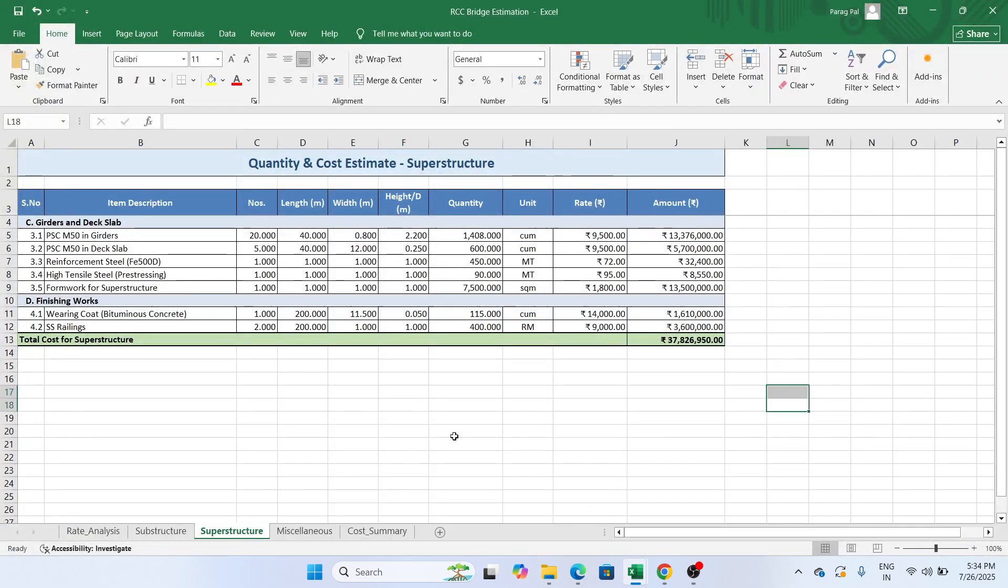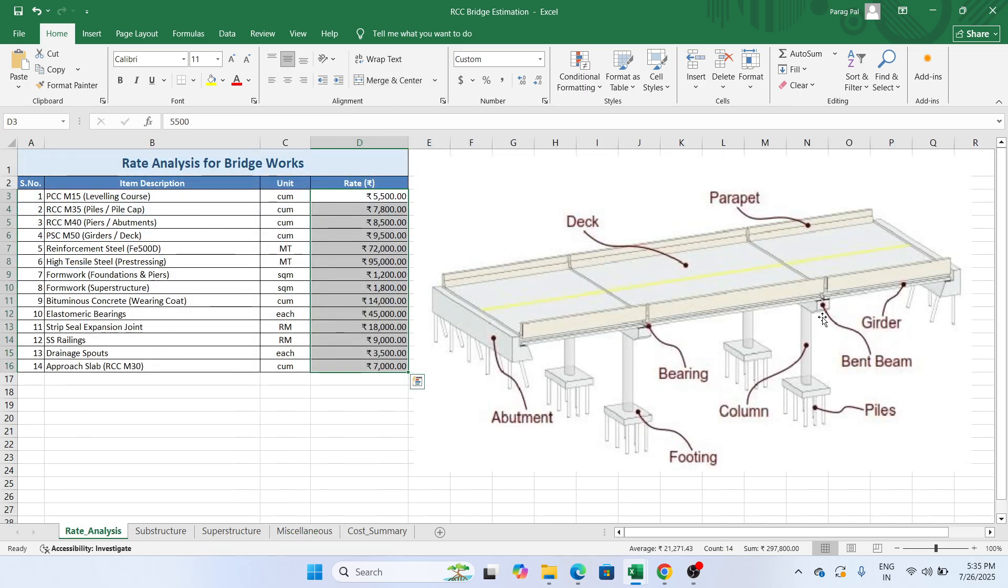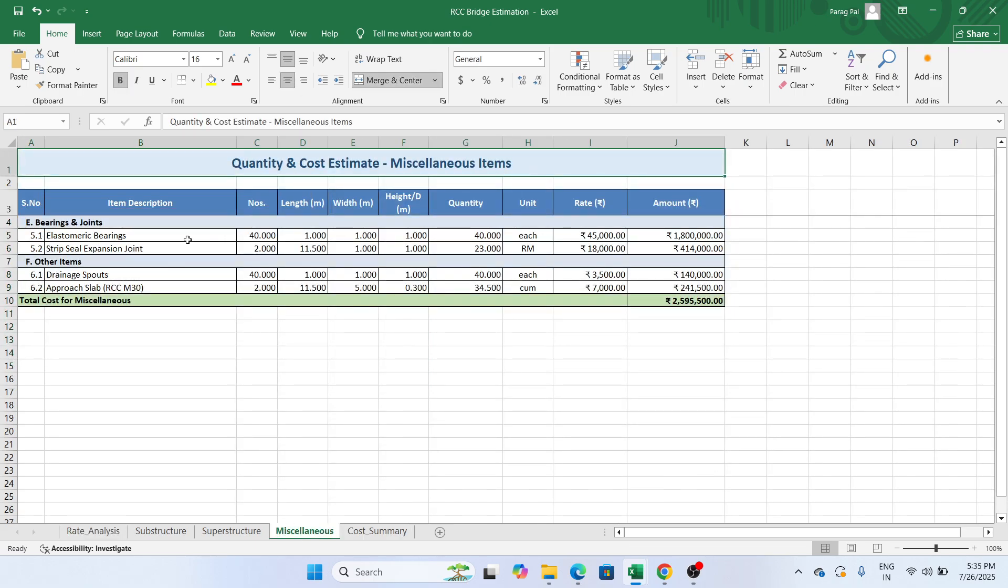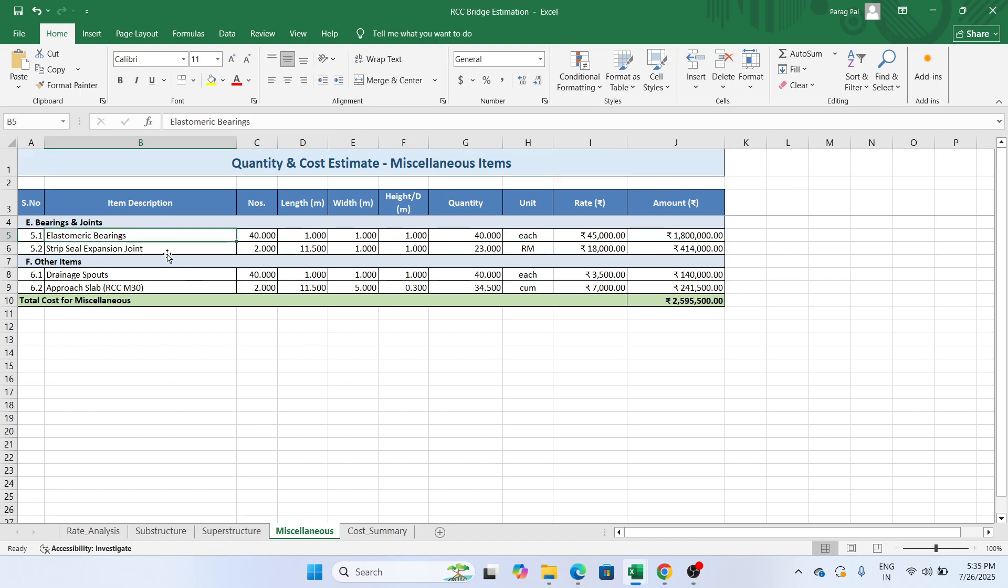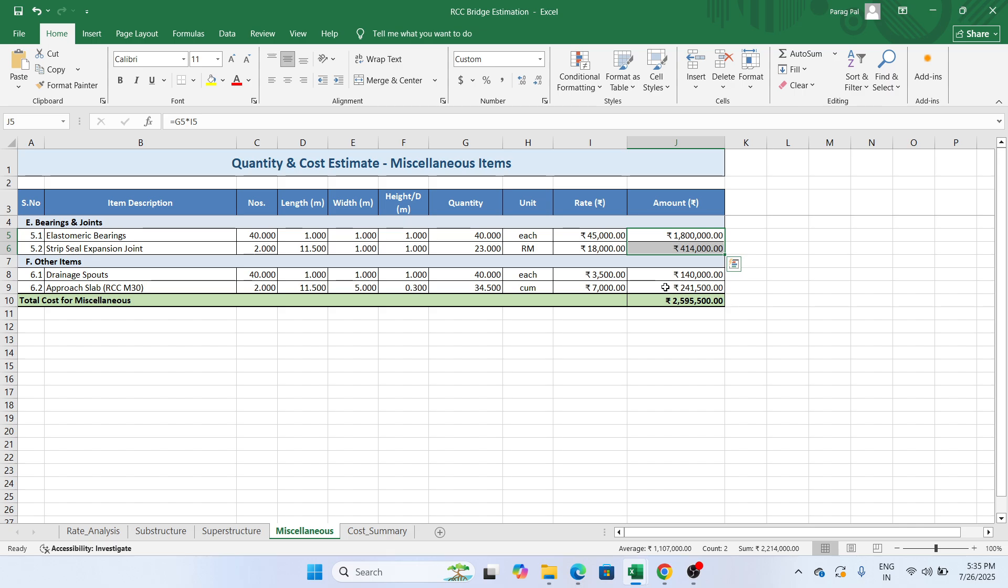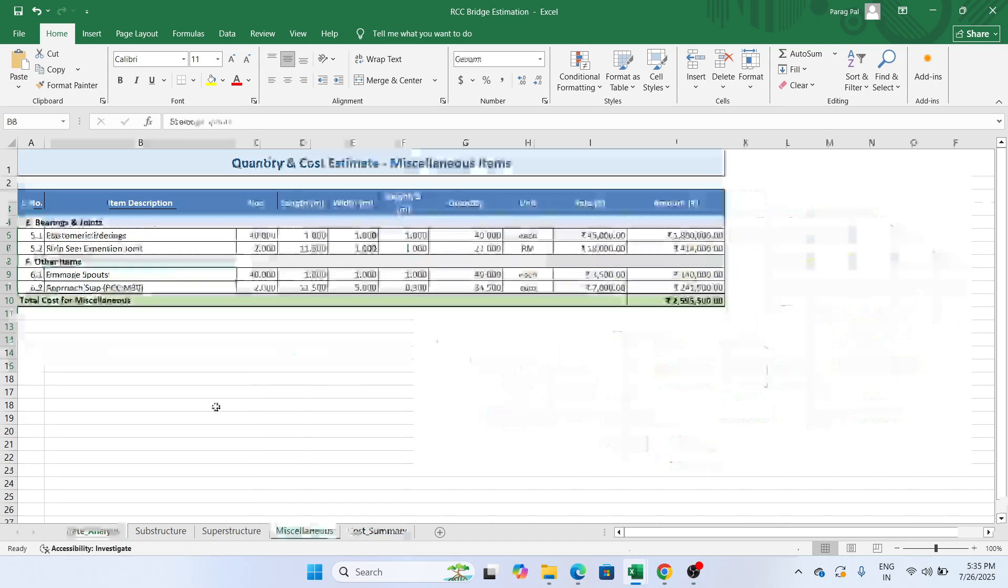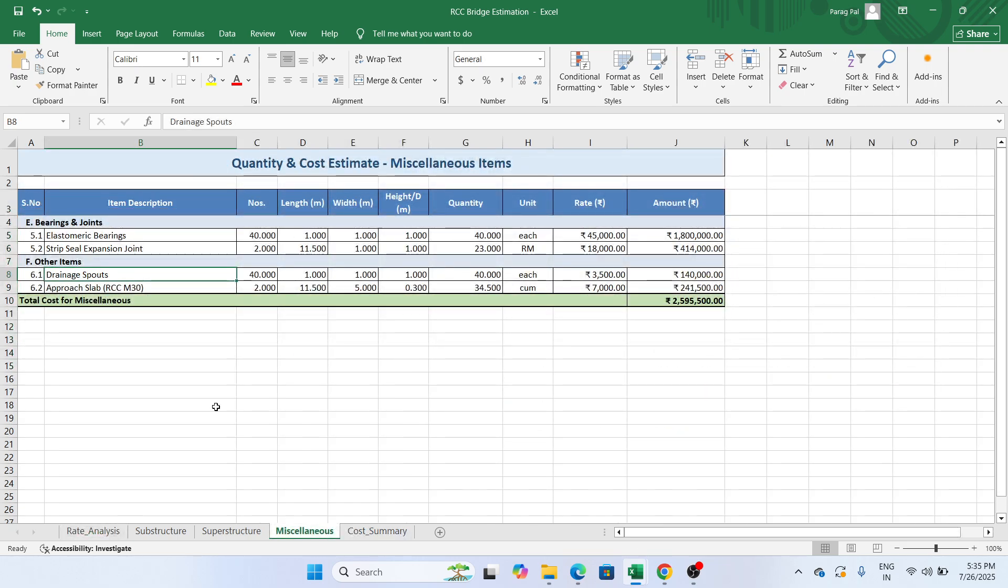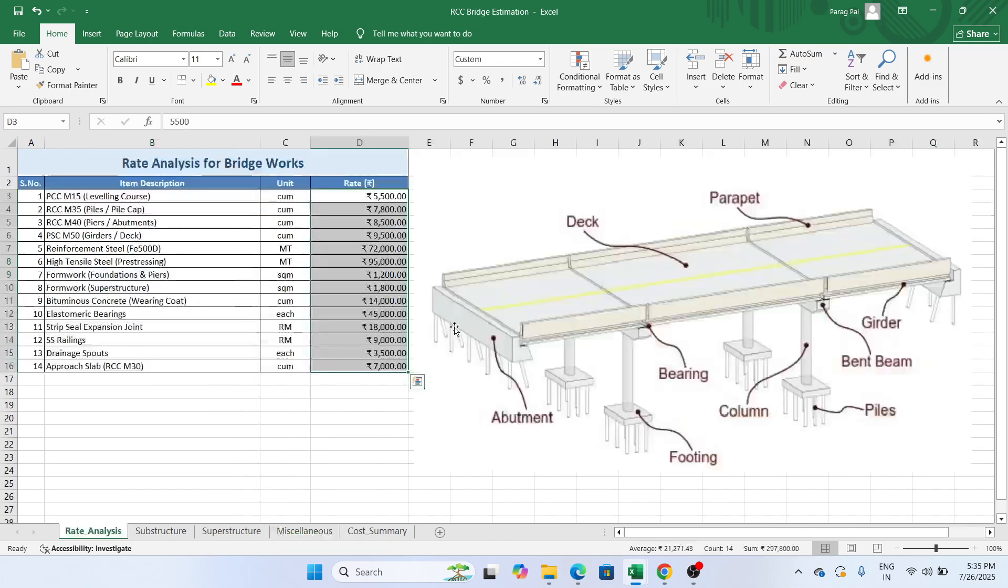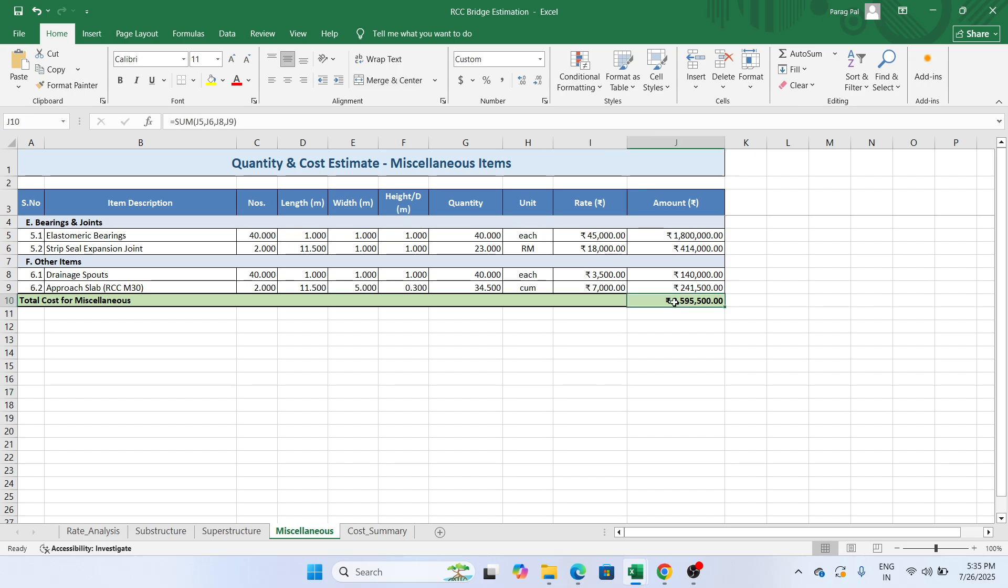Now if I go to the miscellaneous one, you have another database such as bearings and joints. Whenever you do the construction, you can see in this connection we usually provide the bearings and there are some joints we have. What kind of bearings we provide? Elastomeric bearings. Strip steel expansion joints we provide. We need to address the length, width and height so we can get the quantity. Based upon the rate multiplication, the quantity we will get the amount over here. Similarly, other items such as drainage outlet, whenever there is construction you made, you need to give some drainage outlet so water cannot be stuck there. Approach to the slab, the approach means the slab approach so the vehicle can enter into the bridge. You need to give data for that and based upon the rate you will get the cost here. Total cost coming approximately 25 lakhs.